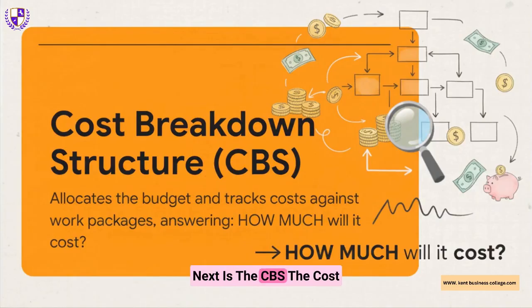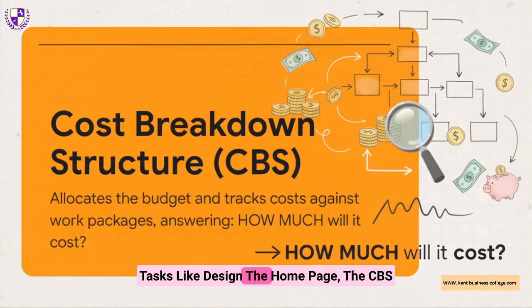Okay, next is the CBS, the cost breakdown structure. This lines up perfectly with the WBS we just talked about. So for every one of those little tasks like design the homepage, the CBS slaps a budget on it and gives you a way to track the spending. It answers that all-important second question, how much is this piece going to cost us?